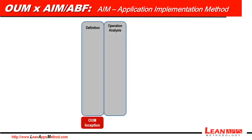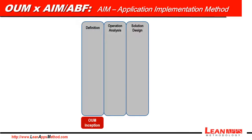The third phase is Solution Design, and the goal here is to use the requirements created during Operational Analysis and finalize the system design and proposed application setups. Both Operational Analysis and Solution Design from AIM are related to the Elaboration phase at OUM, where we develop the detailed requirements, partitioning the solution, creating any necessary prototypes, and baselining the architecture of the system.